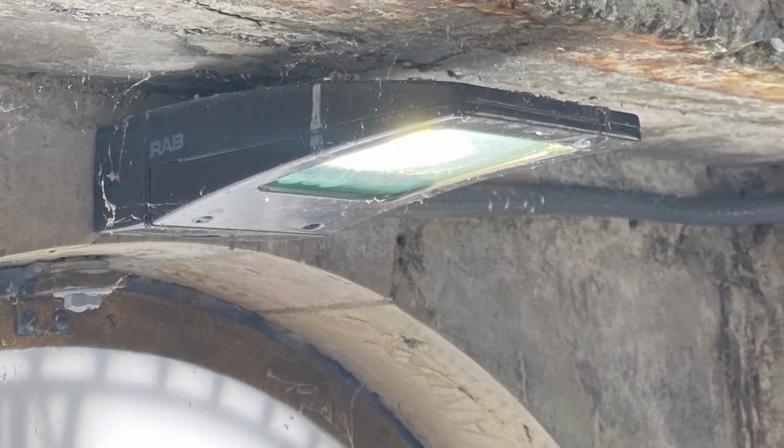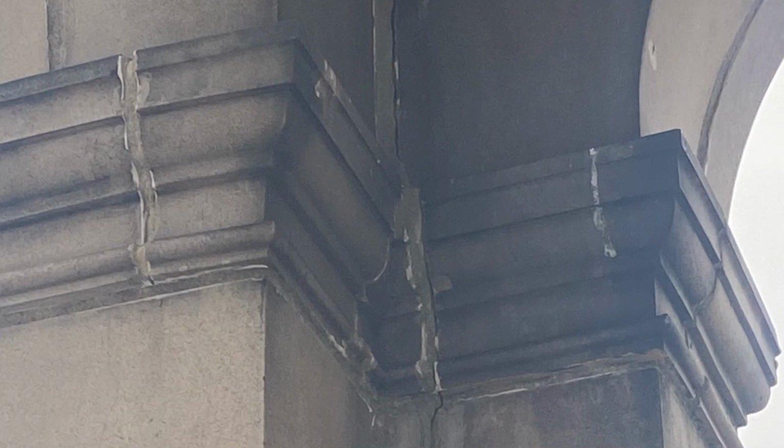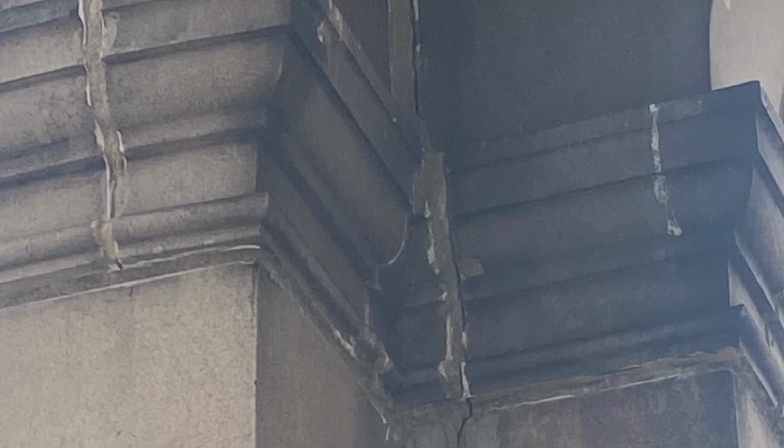How much is this going to cost, or is that simply just too early to tell? At this time, in working with an architect to develop some cost estimates, our best estimate right now to sort of stop the bleeding, if you will, and that is to sort of remove, catalog, and roof over the space, is around $385,000. So we have an application into the Community Preservation Act to fund that sort of initial phase that will help prevent damage from spreading within the building and also prevent any accident or catastrophe, as a number of elements that make up the clock tower are cracked and portions are starting to chip off, and given its height above the street, you never know where something could land from wherever it may fall from.